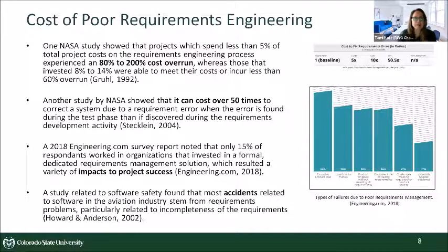And then you also have the aspect that if you don't spend enough time up front determining what the right requirements are, your needs and your requirements, if you don't spend that proper time up front, you tend to see quite a large overrun. This was just a sampling of many, many programs where they were investigating how much time they spent and what their ultimate end cost was.